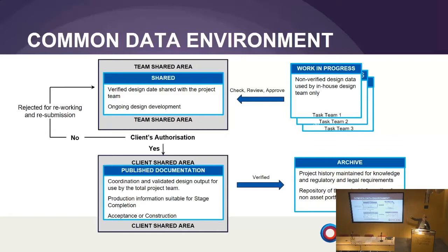One way to think about this is the client hosts the whole thing. That way, nobody can turn the client off. Nobody can take their access away, and nobody can revoke their access. I wonder how many clients have the capability, the understanding, the technical people to host the common data environment and make sure this system is set up in place. There may be some, I don't know. Another way to do it is to allow a consultant to host it all fully, and the client could take a copy, but it seems a lot of work. How this works, how it works best is unclear.